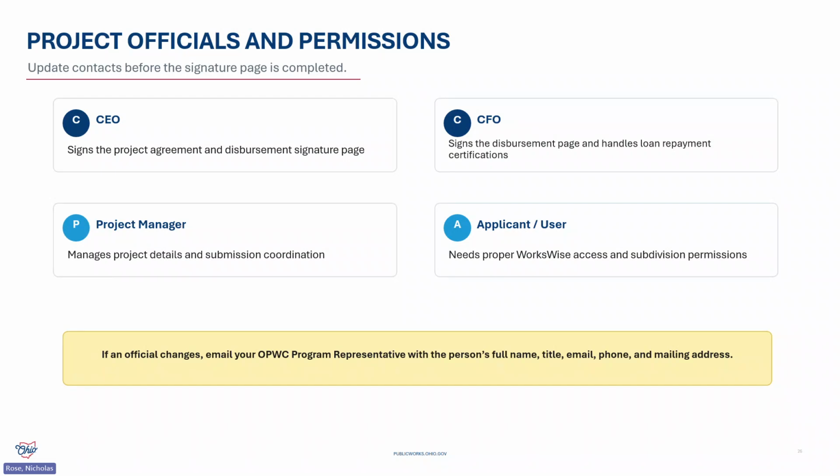If a consultant or contractor needs access on behalf of your community, a letter of authorization from the community will be required. That typically is signed by the mayor, CEO, whoever has that authorization. It can be a city administrator, but it has to be on official letterhead. Updating this before the next disbursement is much easier than discovering the mismatch when it's already in front of us.